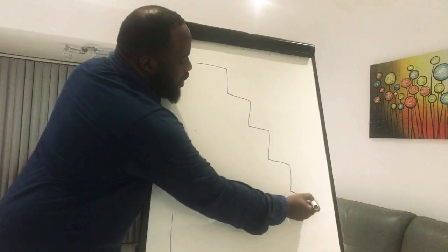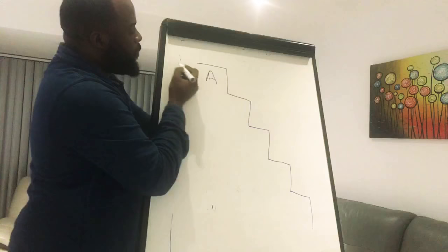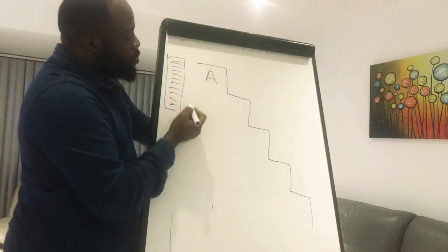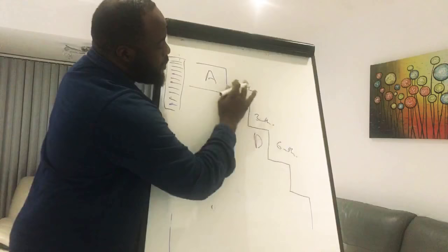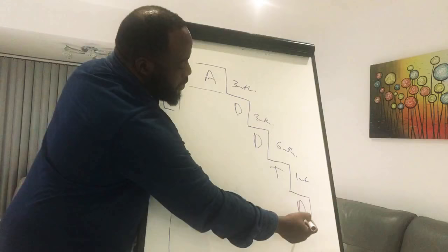So very much, let us analyze all of the requirements. Imagine all of your user stories here. Remember all your product backlogs here. Imagine these are all your product backlogs. So we take everything, we analyze it. That takes us 6 months. Right? We design it. That takes us 3 months. We develop it. That takes us maybe another 6 months. All right. Let's even say this one is 3 months. Right? We test it. That takes us maybe 1 month, and then we deploy it. Okay. Deployment can maybe take 2 weeks.